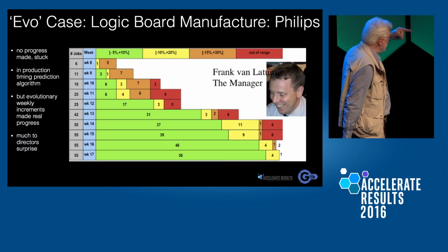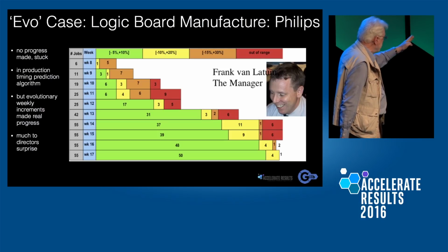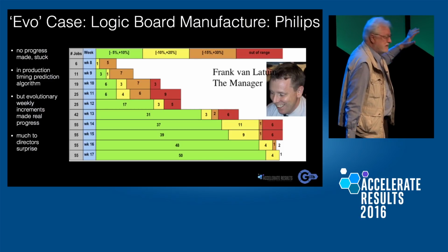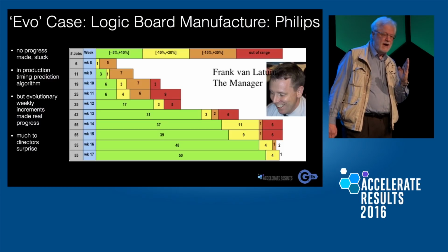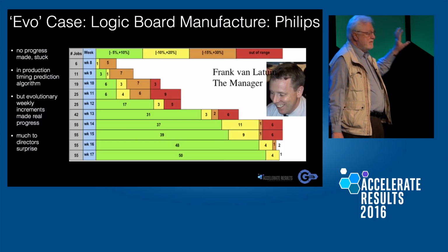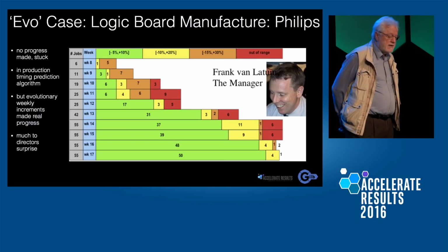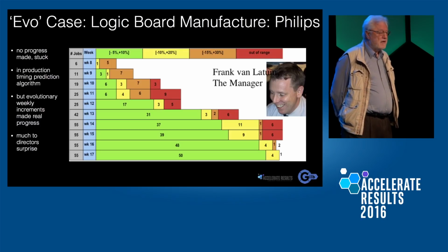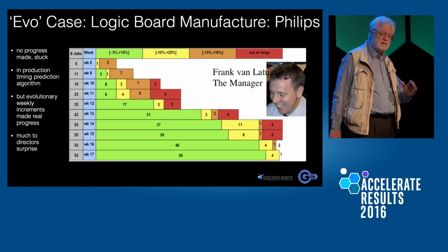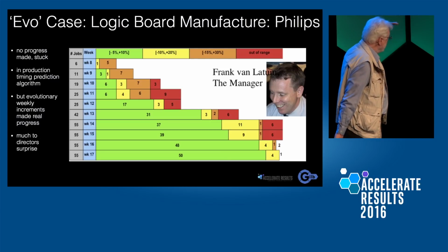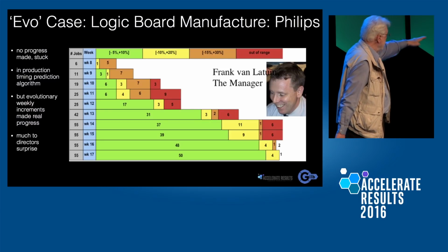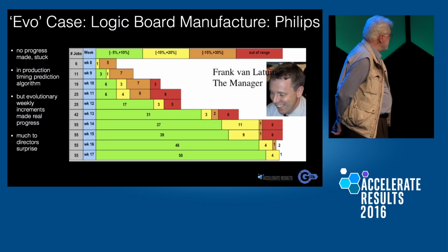And you're looking at the weekly increments where they're running, well, those numbers there represent the number of test cases, test runs, right? And you're looking at the gradual increase in the delivery of the value of accuracy of estimation of how long the production run would take, right? And you see they're winning, they're doing it. When this diagram was later put in front of his colleagues and the director, there was spontaneous applause. They'd broken through, and everybody knew how badly stuck they'd been. But they'd broken through because they'd learned to decompose and deliver value week by week and get to a point where basically they had a great set of accuracy in the week 17 there.